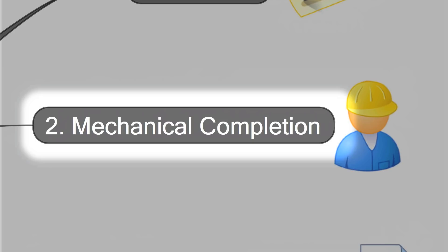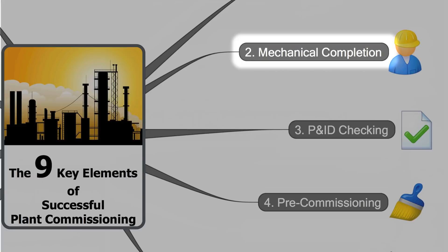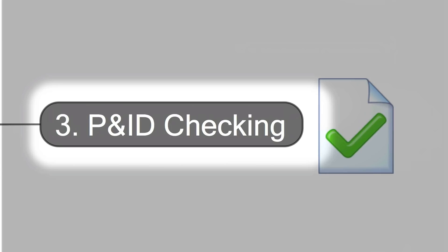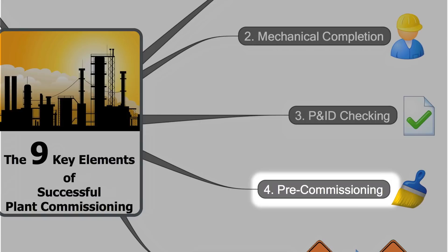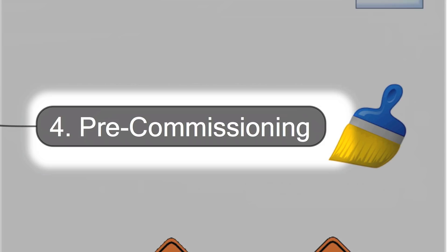The third key element is at the same time the first big task in the field for the commissioning team — it's a P&ID check. The commissioning engineers will verify that everything in the field is built according to the specifications. Pre-commissioning is the fourth key element. It includes cleaning of pipes by blowing and flushing, mechanical cleaning of vessels and tanks, no-load test runs of motors, and much more.